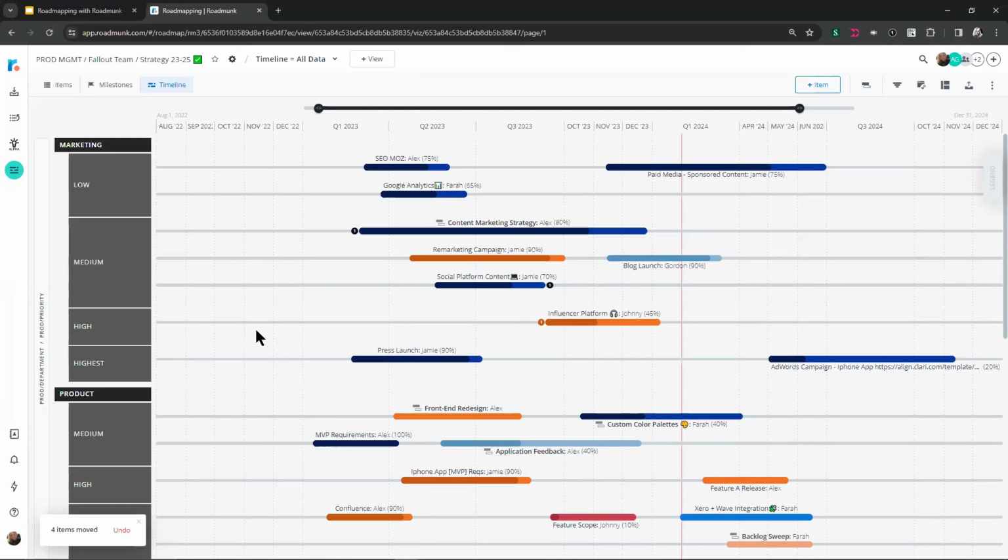Okay, awesome. Another question we have is about portfolio roadmapping. Sorry, I'm making you jump into different views, but a quick one. When you change anything on a portfolio roadmap, does that also make changes to the source roadmaps? It will if you are a member that the source roadmap is shared with and the portfolio view is shared with, then any changes you make on either will reflect on both.